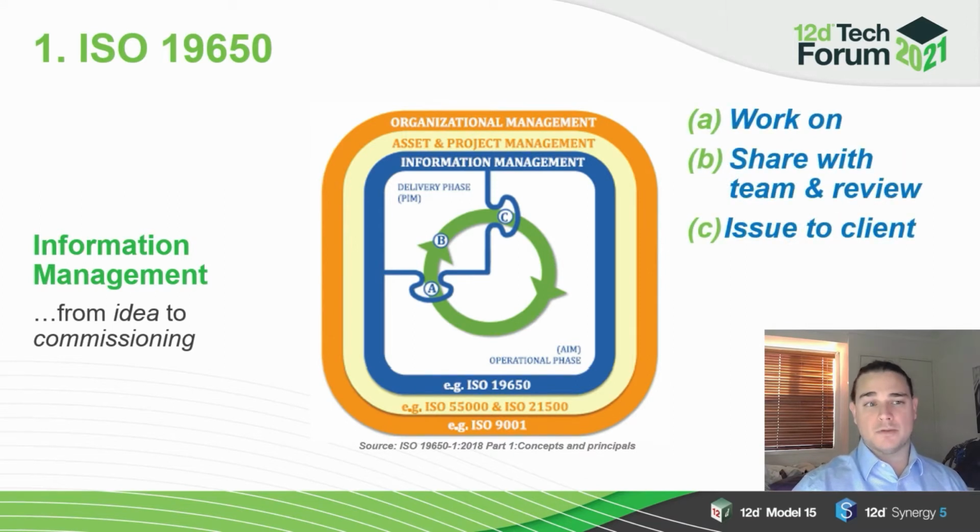To take those terms into an ISO 19650 terminology, we work on information, we create information, then we share that information with our wider team and review it. And finally, we issue that information to our client. And so moving through this piece of the puzzle, that's the progression of our information. That's how we manage the information within the ISO 19650 framework.